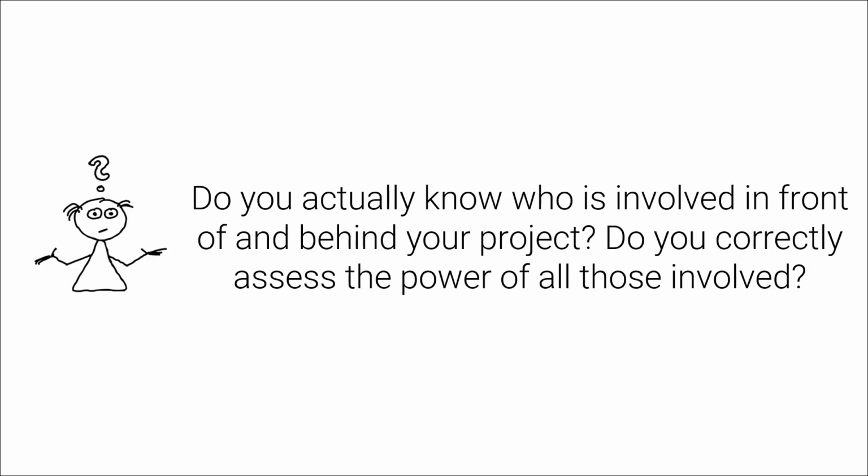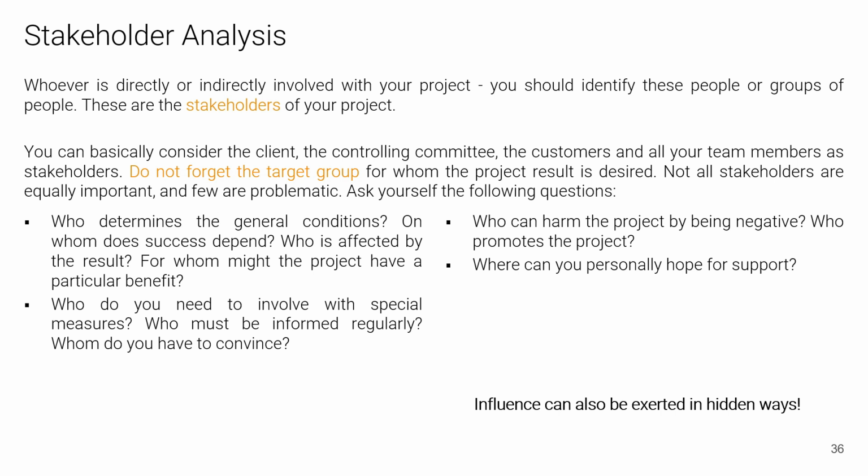I have already mentioned that it is always important in a project to correctly assess all the people involved, and especially in the preparation of a project, the power of the people involved. So we ask ourselves the questions: do you actually know who is involved in front of and behind your project? Do you correctly assess the power of all those involved? To answer these questions, we use the so-called stakeholder analysis. The term stakeholder is often misleading. We state here, whoever is directly or indirectly involved with your project belongs to the group stakeholder.